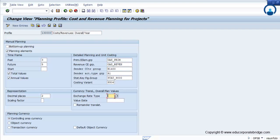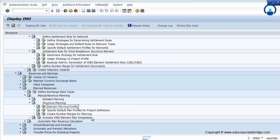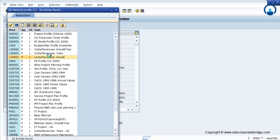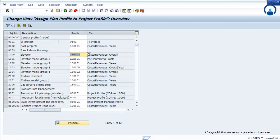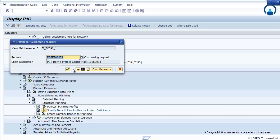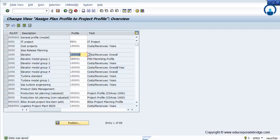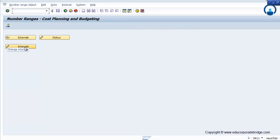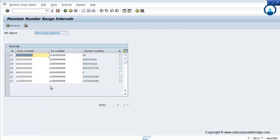You have to maintain the revenue planning profile for the project — select whether it is a project or planning element, what kinds of revenue planning or cost element group you need, what the exchange rate type is, value date, currency for the revenue, and decimal places. After entering all these, save. Then assign the specific revenue planning profile to the project profile. You can also create number ranges for the revenue planning profile, or choose an existing one.